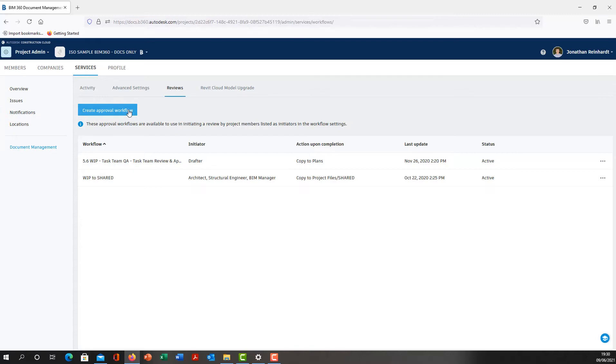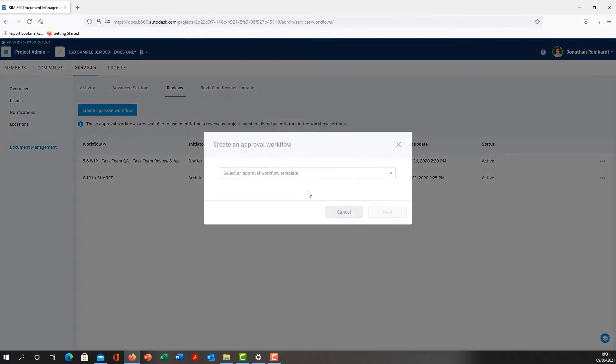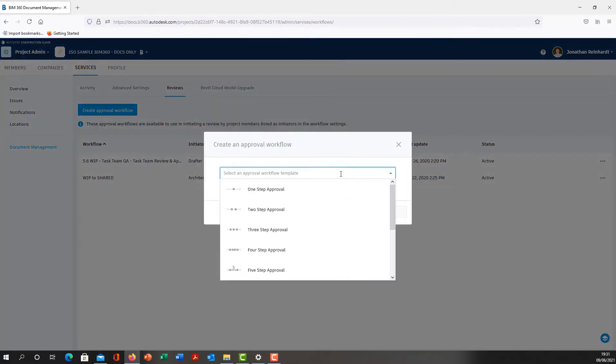Go to Create Approval Workflow. This will allow you to transition files from one folder to the next via an approval and quality checking process. Create approval workflow and select the number of steps you want. For example, the file can move from one person in the one-step approval and then move into the required shared folder, or it can move up to five people or five approvals if needed.